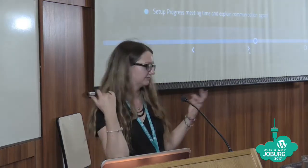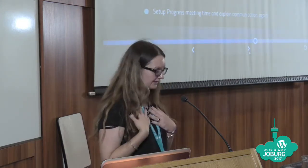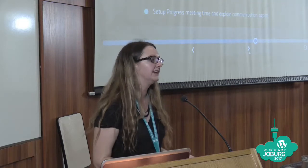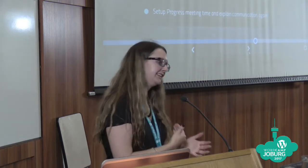And then the last thing is just setting up progress meetings. It's a really good idea to, at the start, tell them, okay, every 2 weeks on a Monday at 10 o'clock, we have a progress call or something like that. It's just a quick 10-minute phone call. For someone like me, if I don't really like that call, but I know it's there, and I know, okay, I have to tell them, this is what we need, then it's a lot easier.